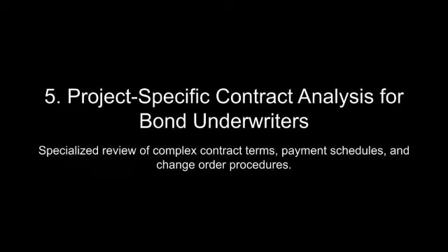For surety underwriters, the degree of clarity and rigor within this hierarchy is a key indicator of risk. Ambiguous or poorly defined authorization processes often lead to disputes, as contractors may proceed with unapproved changes under the assumption that verbal agreements or informal approvals are sufficient. This lack of procedural discipline increases the likelihood of claims, particularly when disputes escalate into litigation.